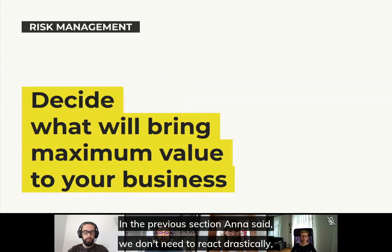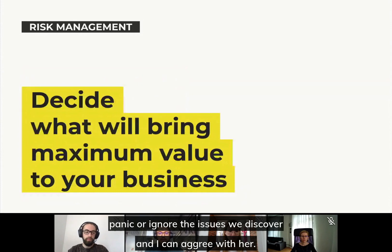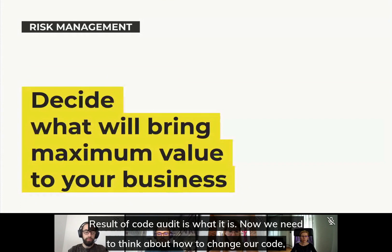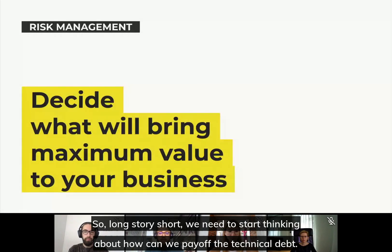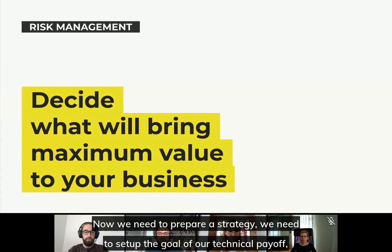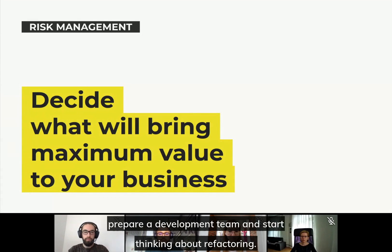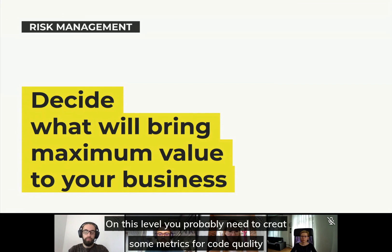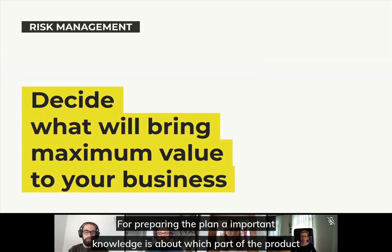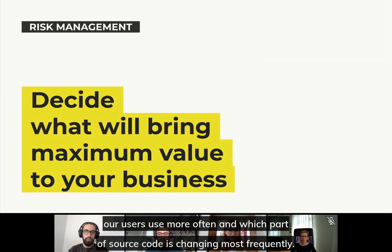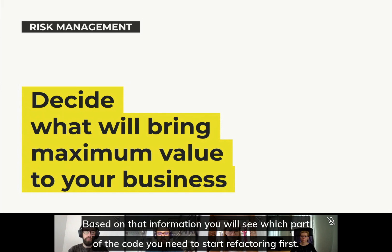We don't need to react drastically, panic, or ignore the issues we discovered. The result of a code audit is what it is — now we need to think about how to change our code to make it easier to introduce new features. Long story short, we need to start thinking about how we can pay off the technical debt. We need to prepare a strategy, set up the goal of our technical debt payoff, prepare a workshop with the development team, and start thinking about refactoring. You probably need to create some metrics for code quality to check if our changes are moving the code to be more maintainable. Important knowledge for preparing the plan is which parts of the product our users use more often, and which parts of the source code are changing most frequently — based on that information, you will see which part of the code you need to start refactoring first.